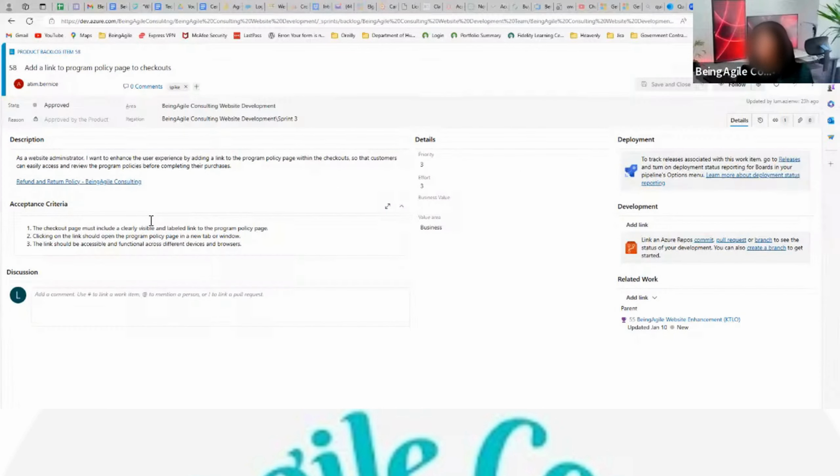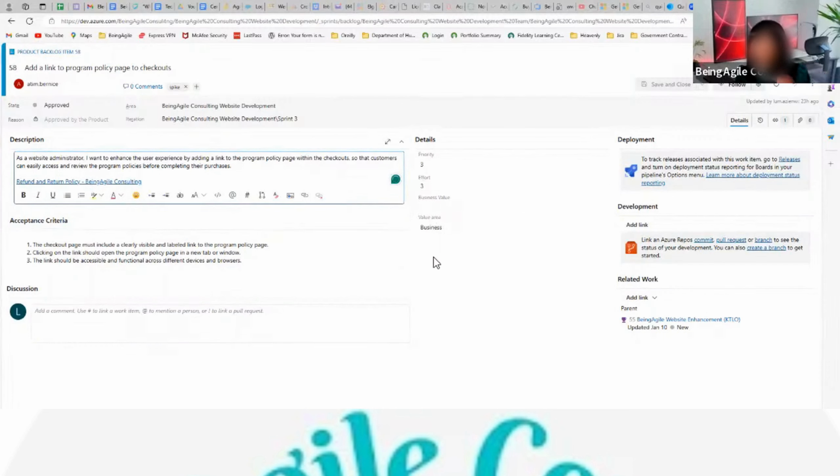Now, this brings me to the next point. You can actually do these items, but capacity doesn't go by story points. Story points is at story level. Now I'm answering the question that one student asked in our last class. At this capacity level, for us to leverage capacity planning, which is why I like this tool, it kind of forces, I don't want to use the word force, but that's the truth, it forces teams to really break down their work in little chunks. That way we have at least some guarantee that they really understand the complexity of the work. They have visibility into the different moving pieces, and it will increase our chances of achieving our goal since we'll be delivering in really little chunks.